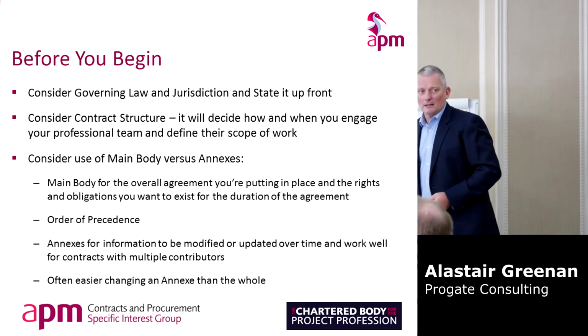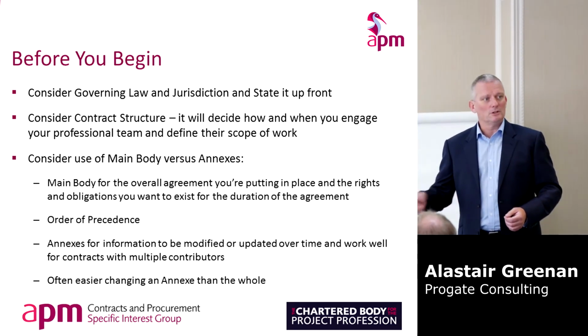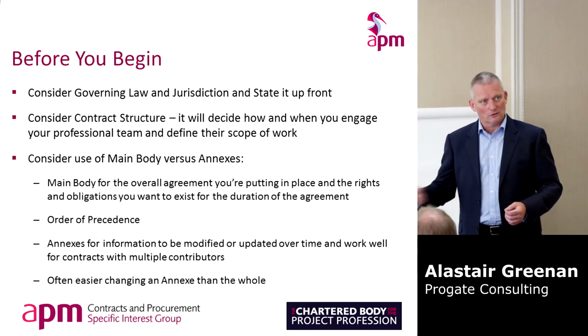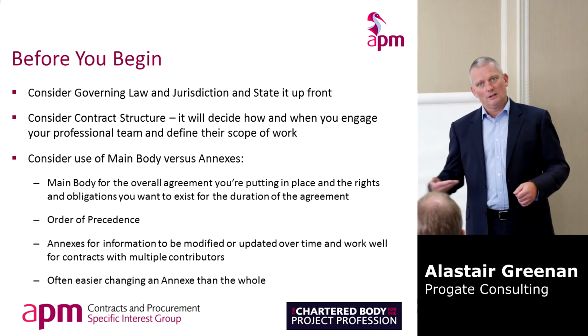But again, think about things like main body versus annexes. Yeah, if you're going to be changing stuff or renewing stuff, it's much easier to swap out an annex, if you've got a multi-year contract and you're going to change what's tucked in underneath it.